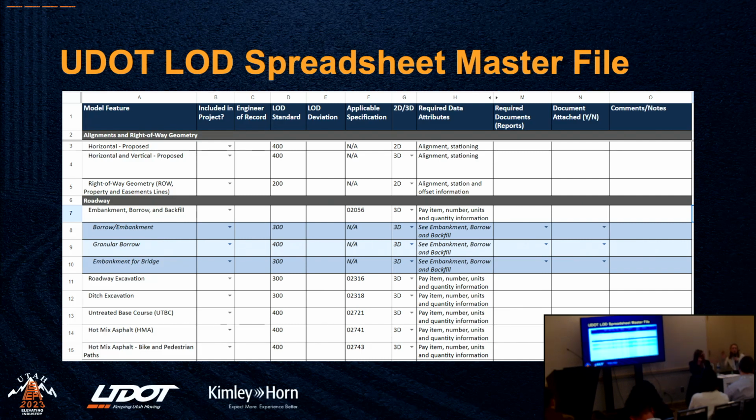So, for instance, the item types are actually not required until 90%. Now, we found that likely you're going to be putting them on a little bit earlier, but the full build out wasn't until 90. And then I would say a lot of the effort got shifted a little bit later in the game, because you're really curating those models at the end once all the project decisions have been finalized. So schedule-wise, that was probably something we found as a project team.